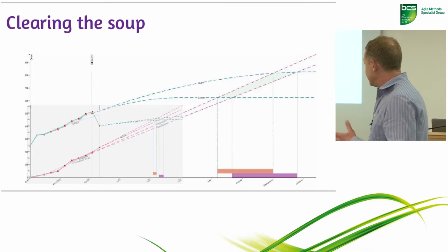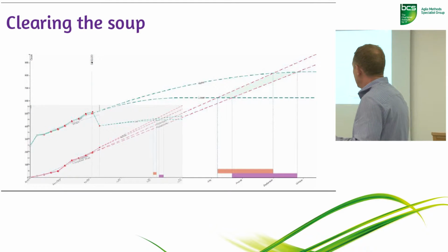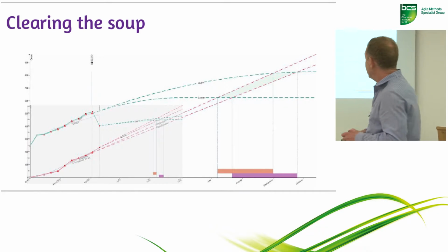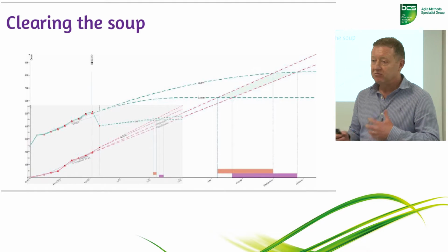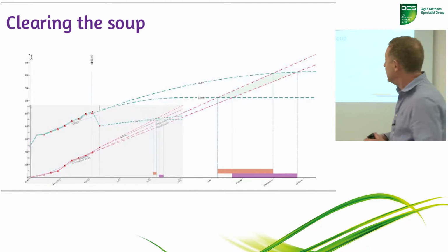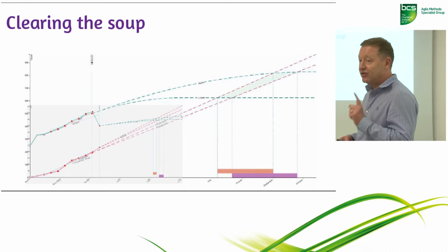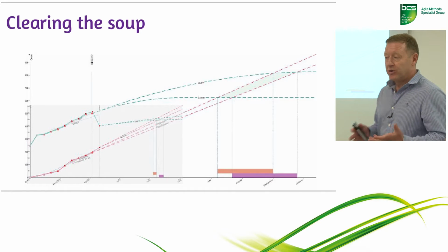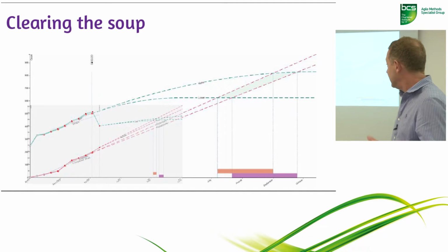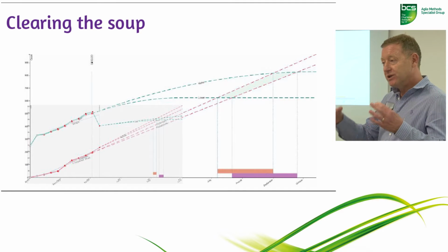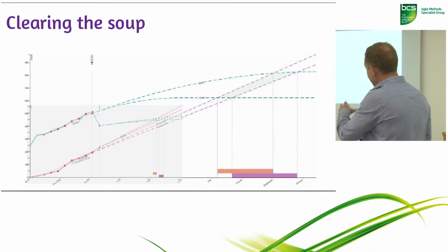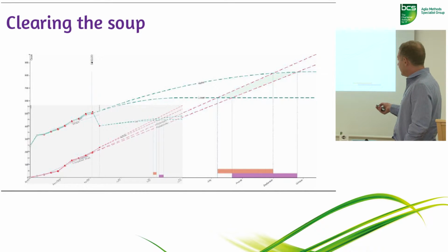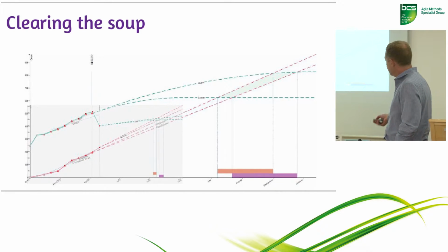One example of that is a client of ours who are working on a very important project to them. It's absolutely core to their business. There's about 120 of them, 100 plus anyway, working on this program. And it has to go live in June. We started to work with them earlier this year. They're on Jira, and we plugged our tool into their Jira and began to show them that it wasn't going to go live on those current trends until end of July, middle of July at the earliest.